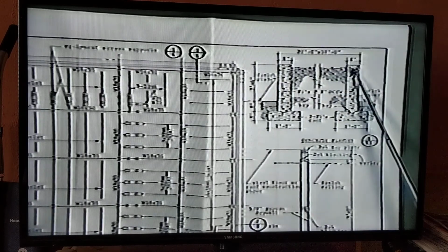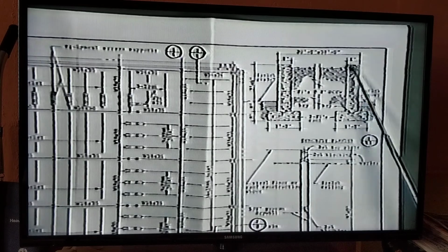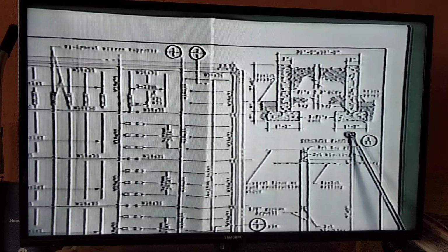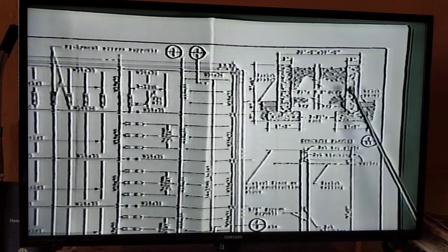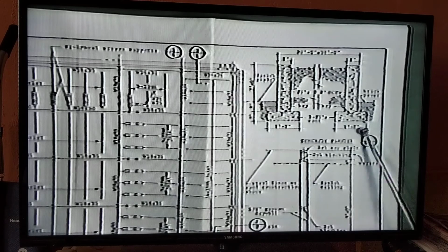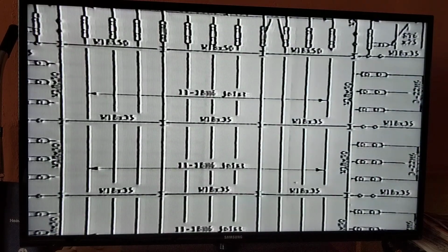We get to the center line, so we subtract 8 inches. That would mean there's 9 feet 4 inches from the center to the center. We then add back in 2 sets of 10 inches. So 9 feet 4 inches plus 1 foot 8 inches will get us to the outside measurement in the short way. The rest of the sheet is very similar to the previous page, with an additional bit of information